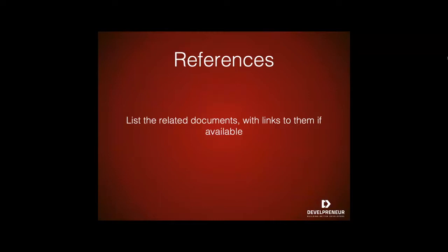References. While not mandatory, it is a good idea to include a reference section that refers to other project-related items, plans, or documents which contain information relevant to the project. This section will contain a list of related documents with links to them if available, including the following: a project plan, quality assurance plan, configuration management plan, project specifications, business documents, related policies and standards, and for lower level plans, reference to their higher level plans.